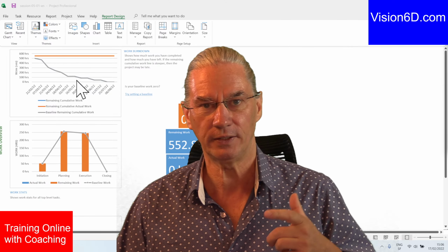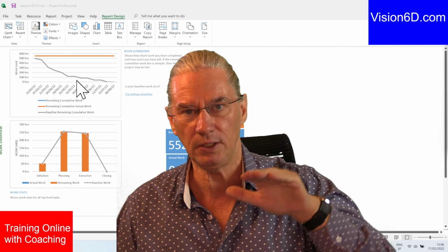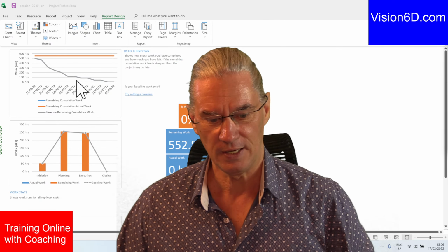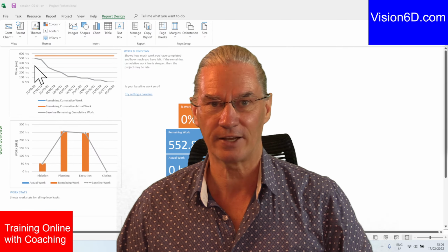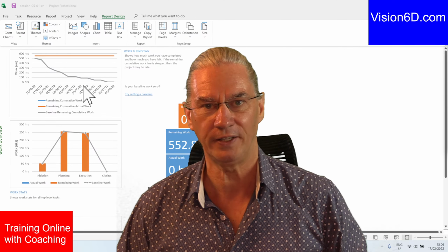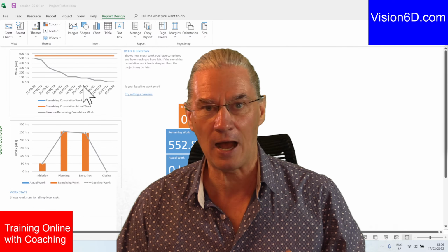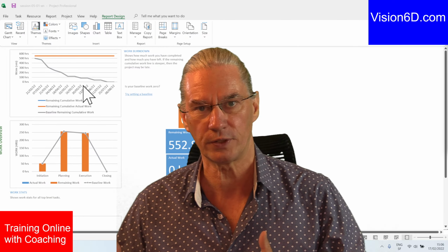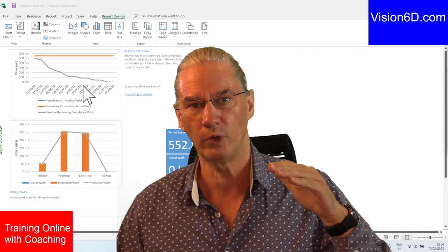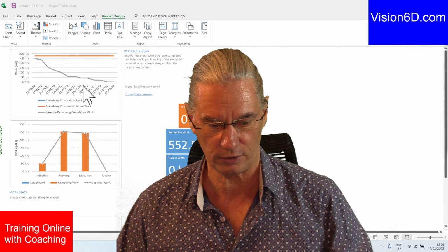It's the graph which shows at which speed the work is done into the project. So this is in gray because it's how we've defined it in our project, and it's in fact the baseline, how we expect this project's work to evolve, the speed at which we are going to reduce the work into this project and do the things.